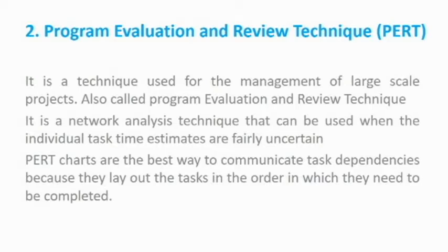It is a network analysis technique that can be used when the individual task time estimates are fairly uncertain. That is, when the time estimate is not really known, we can use the PERT.